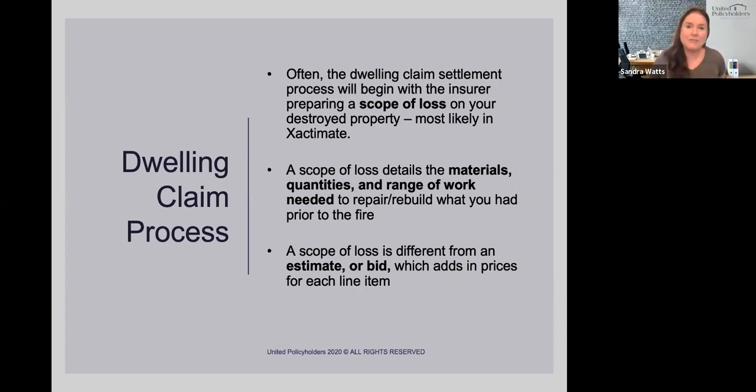You have to have this correct, because when you start sending in estimates, say they send you an estimate and it's wrong, and you go get a contractor or a scope writer or somebody like that to give you an estimate, and you spend the time with this person and this accurately reflects your house. When you send it in to your insurance company, you're not comparing the same items. Also, you can't take the scope that the insurance company gave you and give it to a contractor to bid if it's not already correct. So there's a lot of reasons why.